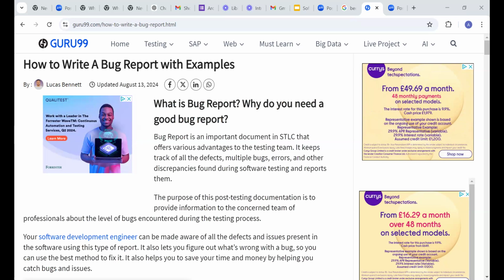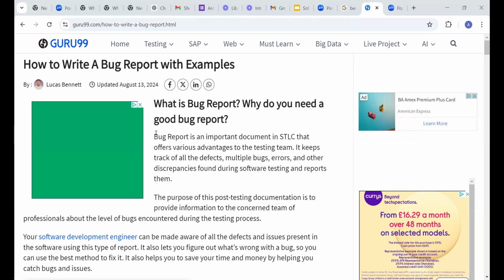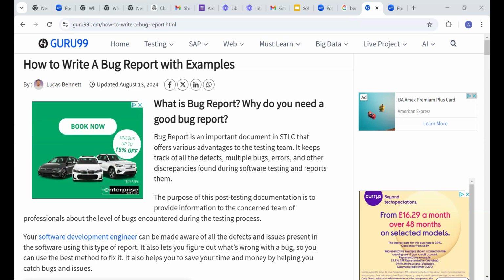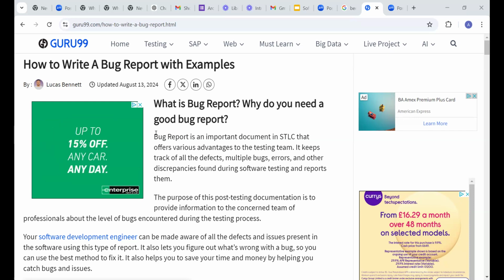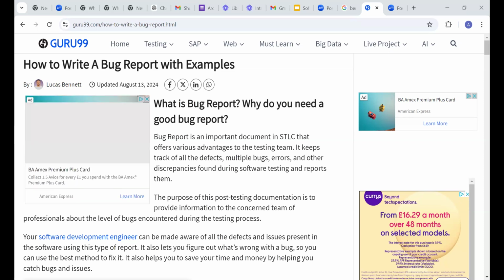Like I said, for example, maybe throughout the testing, you found 200 bugs. And then you also identified the number of bugs that were closed and maybe the number of bugs that are actually pending, right, to be fixed by the developer. So it gives you kind of an overview, right? It gives the stakeholders an overview of what they should expect in the application. In the case where maybe of the 200 defects, only 50 have been closed and 150 remain, Mr. Akim Anoge, do you think that application can go live?